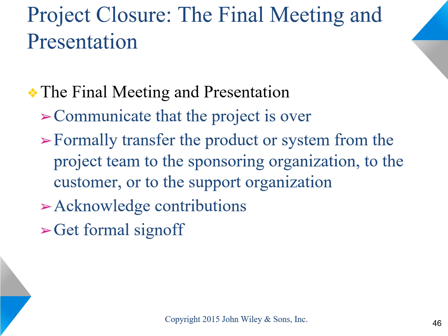It's always good to have a final meeting and presentation where you communicate clearly with the key stakeholders that the project is over. You transfer the system to the sponsoring organization and to the support organization.